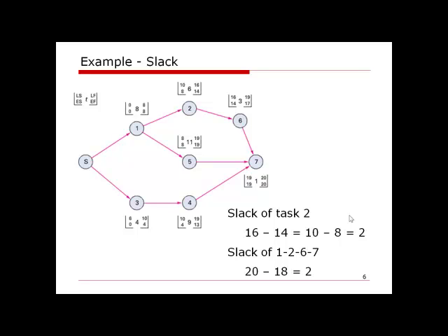However, one thing we need to remember is the slack time for all the activities located on the critical path will always be 0. Here we mean activities 1, 5, 7. The difference will always be 0 between the ES and LS, and EF and LF. Because they are the critical path, they determine when the project will be finished. There is no slack for any activities located on this critical path.